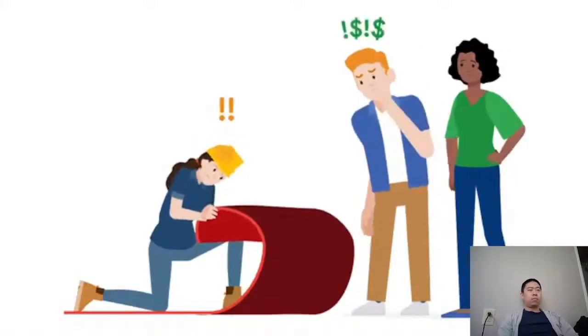Changes should be measured against the baseline estimates of scope, budget, and time allotted for your project, given the original requirements. Be mindful that when you change any one of those things, there may be knock-on effects, which could be positive or negative. For instance, your clients may believe they have beautiful hardwood floors hiding underneath old living room carpet, and want to pull up the old carpet and use the original hardwood floors underneath. You, the project manager on this particular construction job, have budgeted to have the carpet removed and the old floors sanded and stained. Bad news, you pull up the carpet and find that the floors are in bad shape and rotting. They'll need to be replaced or repaired, which could be costly, so your timeline and budget are likely to take a hit.